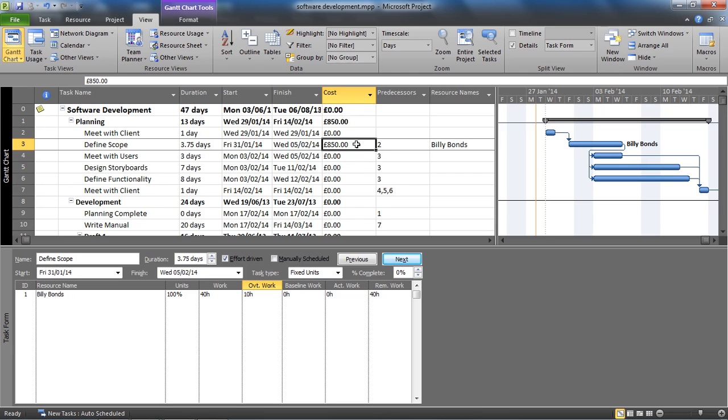Although it's quite commonplace, that's not what I wanted. I wanted it to say that he's doing eight hours a day plus the extra two hours. It's not going to affect the duration of the task. I just want to make sure that Project includes the costings because he's getting charged and I have to pay him that a little bit more for the overtime.